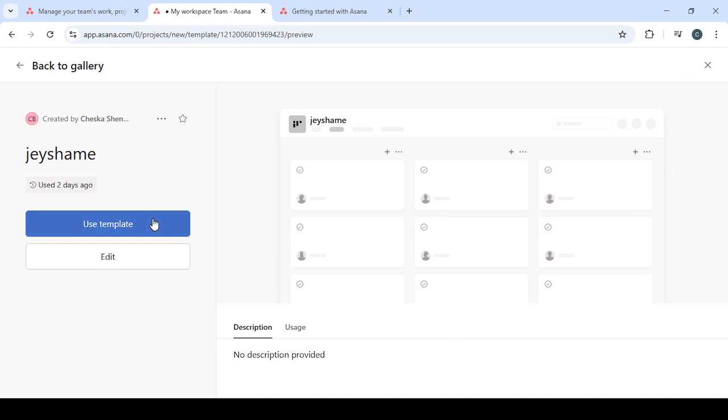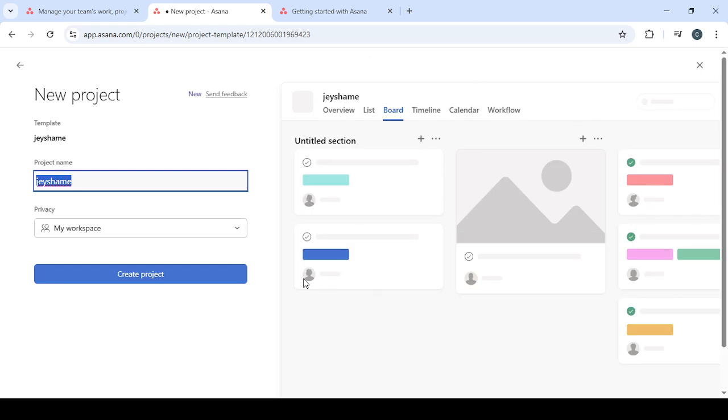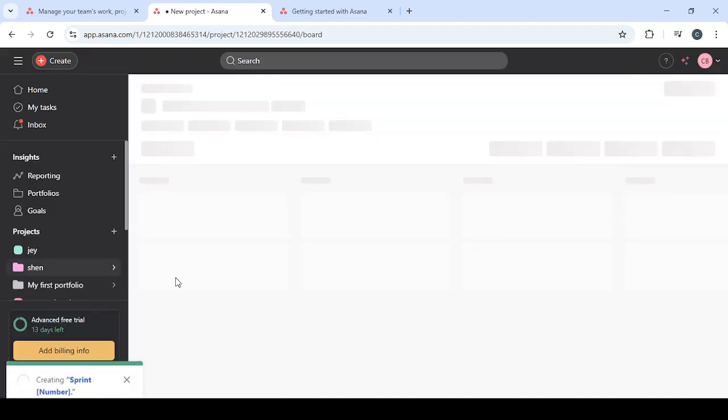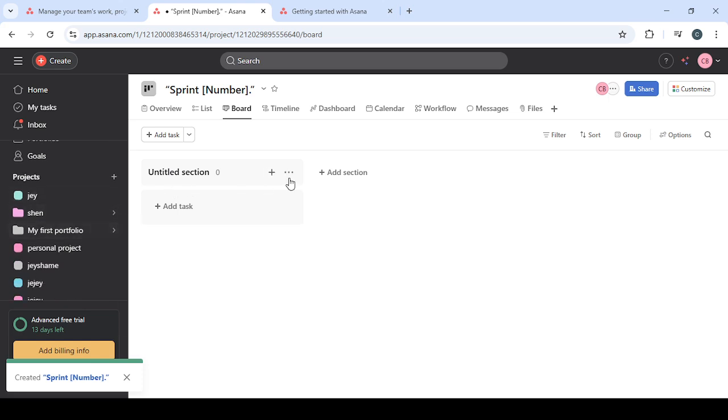Now add tasks that represent your sprint backlog items. Each task should reflect a single, meaningful outcome. Give it a clear, action-oriented title, and include a concise description so anyone scanning the board understands what done means. If a task feels too large to complete within the sprint, consider splitting it into smaller deliverables that still provide value. You can also capture lightweight notes such as acceptance criteria to align expectations without overloading the board.